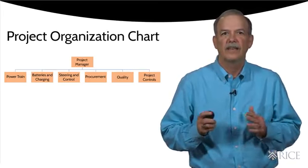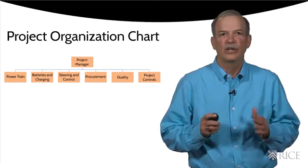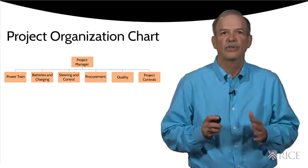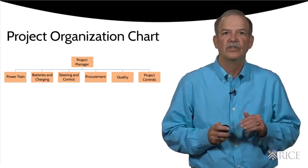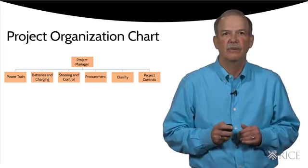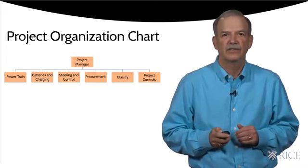It's critical that these latter functions are included in the organization chart and that they report to the project manager. They report to the project manager so that independent views and actions can be provided to the project independent of the functions.